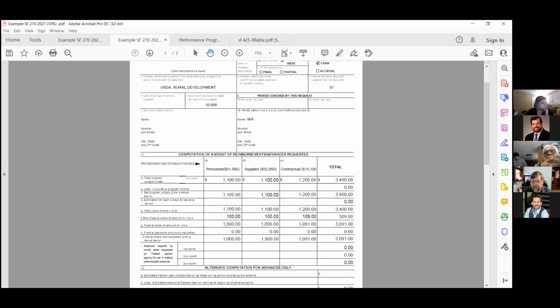There was a question: can you use labor match across all the categories? It depends on how you broke it out in your work plan and budget. But yes, if you purchase supplies, but then you're also showing your labor of you going and purchasing those supplies, or however it is, you can use it that way. You don't just have to use the labor for that personnel match. That was just the category that I picked to show it.